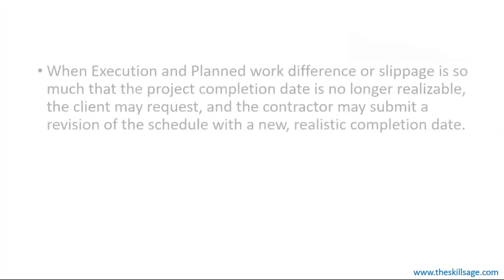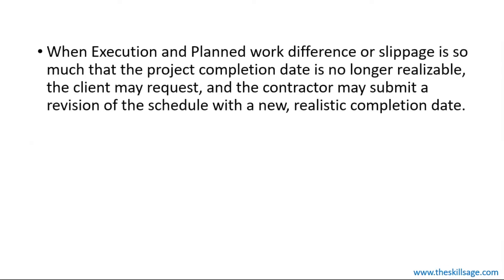For a project recovery schedule: when the difference between execution and planned work — the slippage — is so great that the project completion date is no longer realizable, the client may request and the contractor may submit a revision of the schedule with a new realistic completion date. I will share the whiteboard to explain this point.